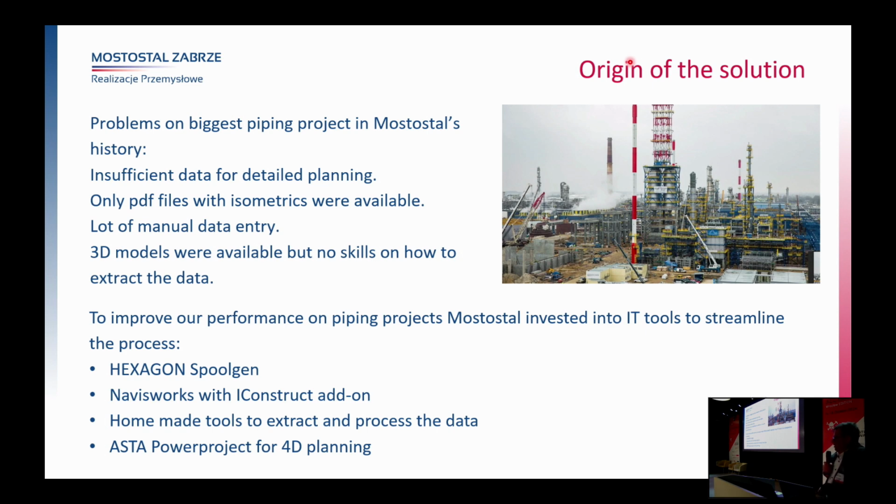Software, I think the most popular on the market is the Primavera, but Asta, in my opinion, has got even better possibilities, and also it's got the 4D module. It used to be called BIM because we can attach the 3D model in IFC format to this time schedule and present how the site will look at different stages of construction.